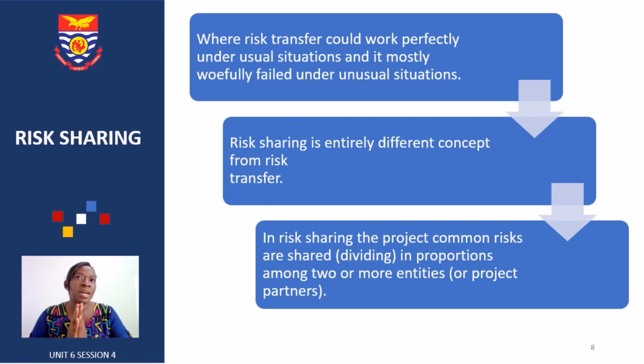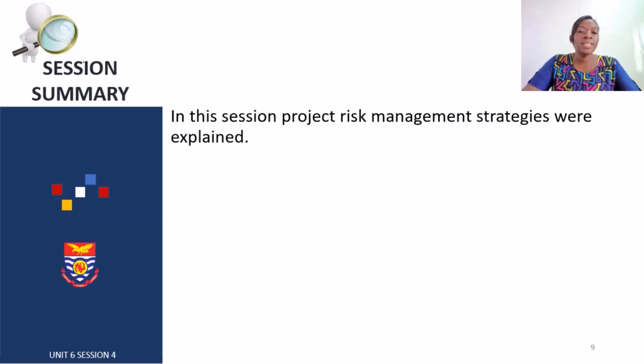Sometimes you can have a contract such that if there are delays, you the contractor take this percentage, and the client takes that percentage. That is risk sharing. That is the idea about it. But with risk transfer, if this thing happens, you are the one who is solely responsible for it. So in this session, we have looked at risk management strategies, which we explained quite a number.